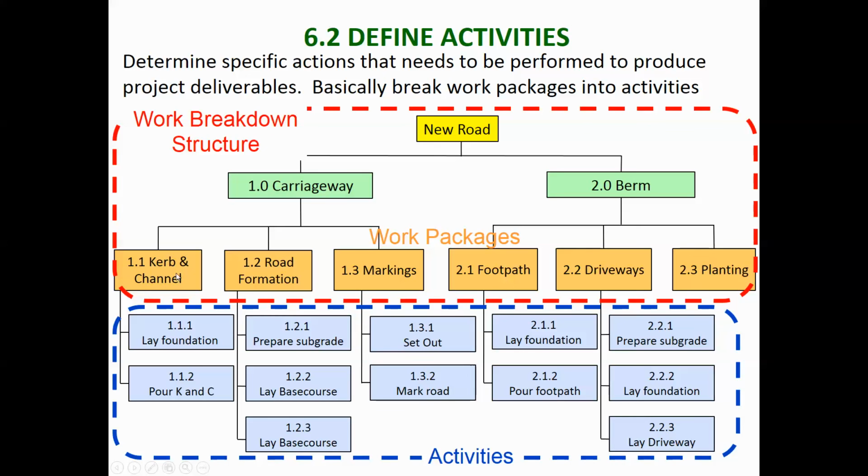You give the curb and channel work package to a foreman, and he's the one that's going to break it down into the activities and do it all. But at the project management level, you're really working at work package level, which is why I'm reluctant to use this one where I'm breaking it down even further. In other projects you may find that people break it down into activities and link all the activities. For bigger, more complicated projects, they may well do that, but for most engineering projects you can probably get away with working at work package level.